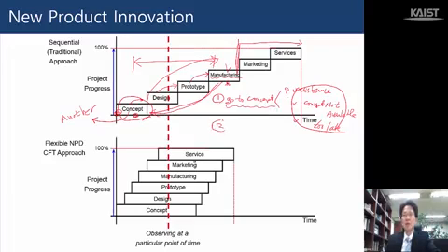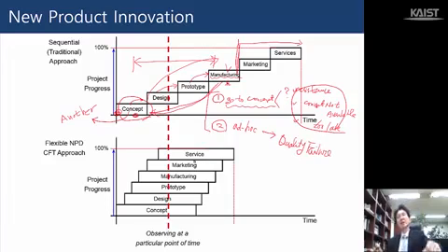If they cannot go back to the concept to fix the problem at a fundamental level, if that's not possible, what can they do? They can do some ad hoc solutions, maybe informal and incomplete solutions, and that will actually increase the possibility of quality failure. Especially we know that if the problem is not resolved at the manufacturing stage, then the quality will go down significantly.